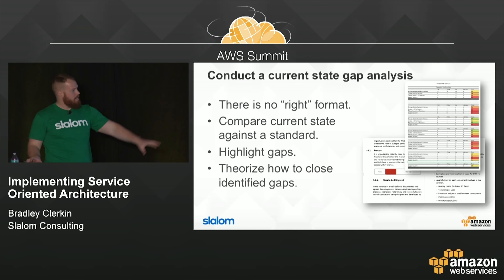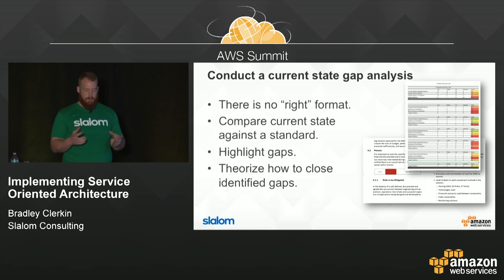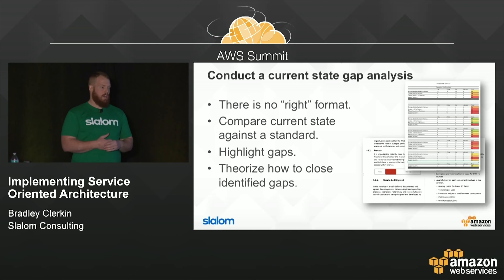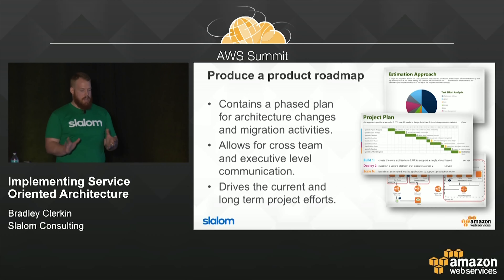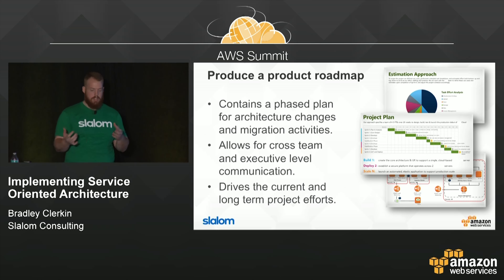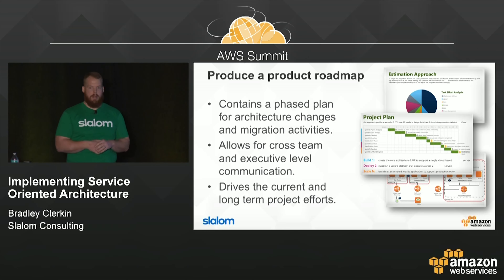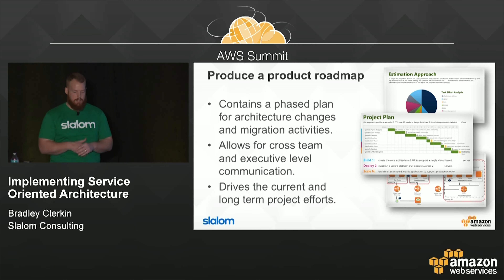The current state gap analysis compares current state against the standard, highlights where your biggest gaps are, and theorizes how to close those gaps — likely with architecture changes and bringing in new services. Once we have that gap analysis and have theorized the activities needed to close those gaps, we put those into a product roadmap. The roadmap typically contains a phase plan for architecture changes and migration activities, used for cross-team executive-level communication. One important note: always point people to the latest version — publish it to a shared location, because what you publish week one will be wrong by week eight as you learn more.